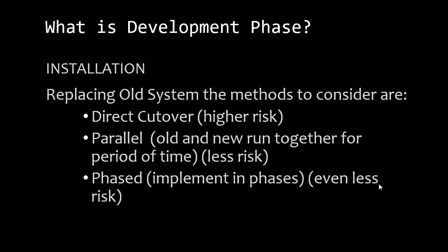What's a period of time? I don't know, weeks, months, all based upon the complexity of the system maybe, and how important it is to the company. Another one's a phased approach, where you just implement phases of the new system over time, okay? We're gonna implement this first, this second, this third, this fourth, along with running the old system at the same time. So you're running the old system and the new system, and you're just putting pieces in the new system until you feel very comfortable with it, and once again, you cut off the old system.